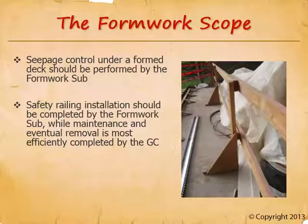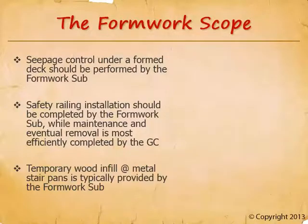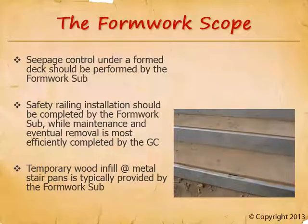Safety rails should be constructed by the formwork subcontractor, but maintenance and eventual removal is most efficiently completed by the general contractor. It's most appropriate for the formwork sub to do them because they will construct the safety rails as they progress along with their work on a daily and even hourly basis. Because these rails will be necessary long after the formwork sub has completed their work, the general contractor should pick up maintenance and eventual removal. It's also a common practice for metal stair pans to be temporarily infilled with wood, so we don't pour the concrete too early and have the finish damaged throughout construction. The formwork bidders are equally qualified and routinely allocated this work — the most important thing, as always, is to be sure it's covered but not double covered.